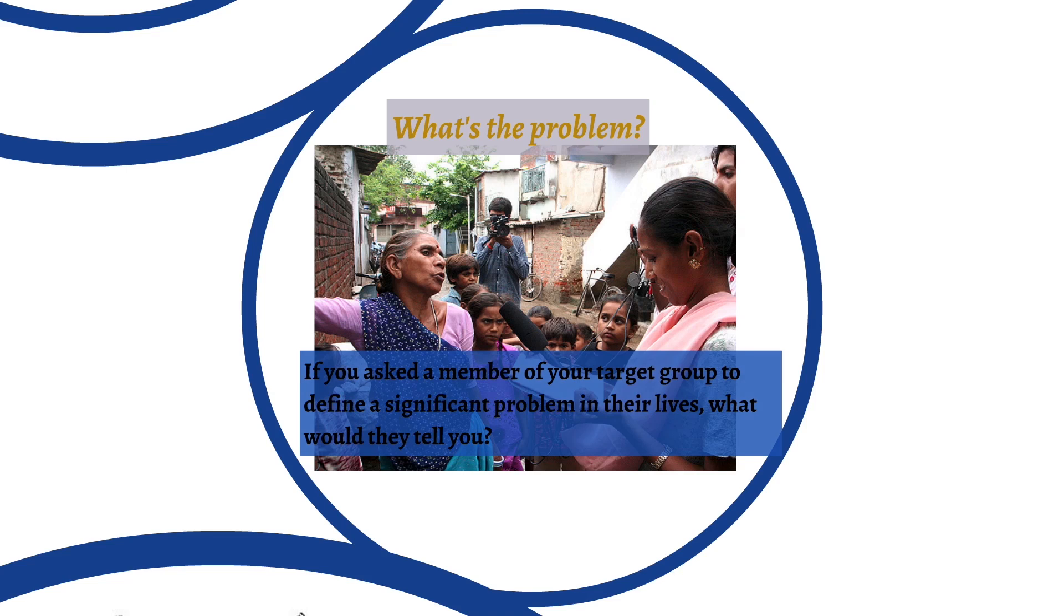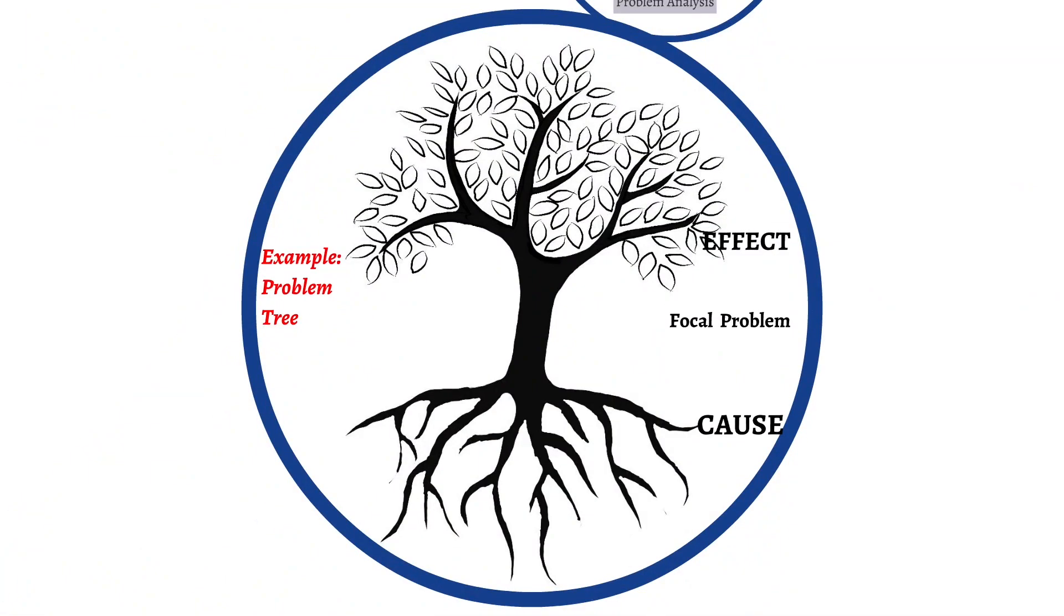So let's have a look at that. What is the problem? If you asked a member of your target group to define a significant problem in their lives, what would they tell you? In their own words and from their point of view, the answer to this question is going to form the basis of your problem analysis. And it's going to be the seed or the focal problem from which will grow this problem tree. Now the problem tree is a tool you can use with your planning team to discuss the really complex network of cause and effect that surrounds every problem. Causes form the roots of the problems. Effects are the things that flow out of the problems. And the focal problem itself is the trunk of the tree or the center.